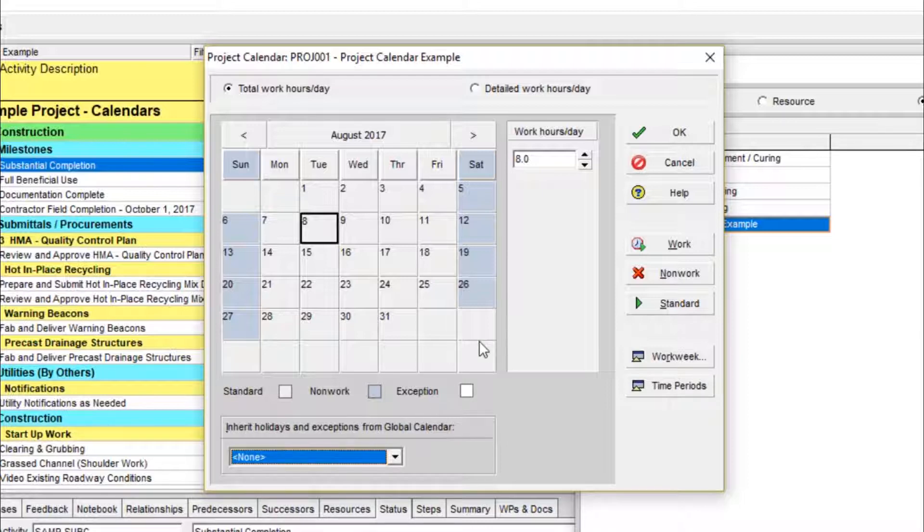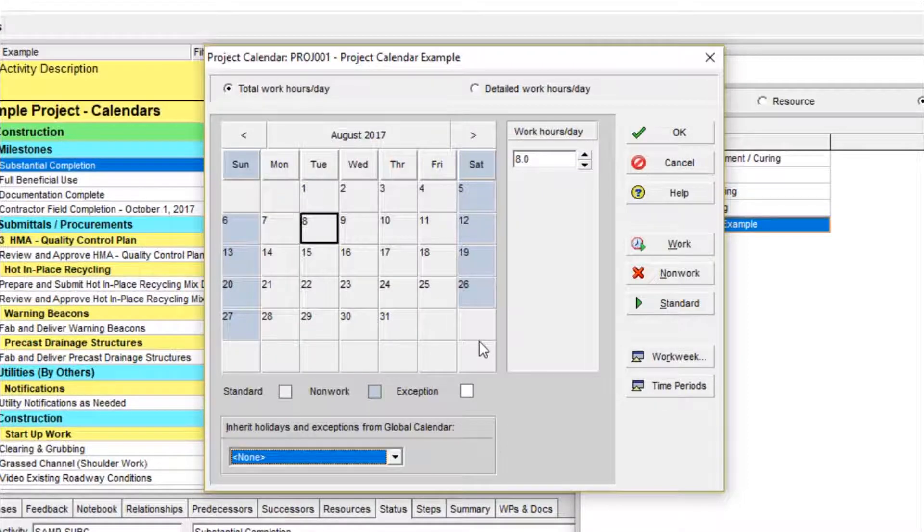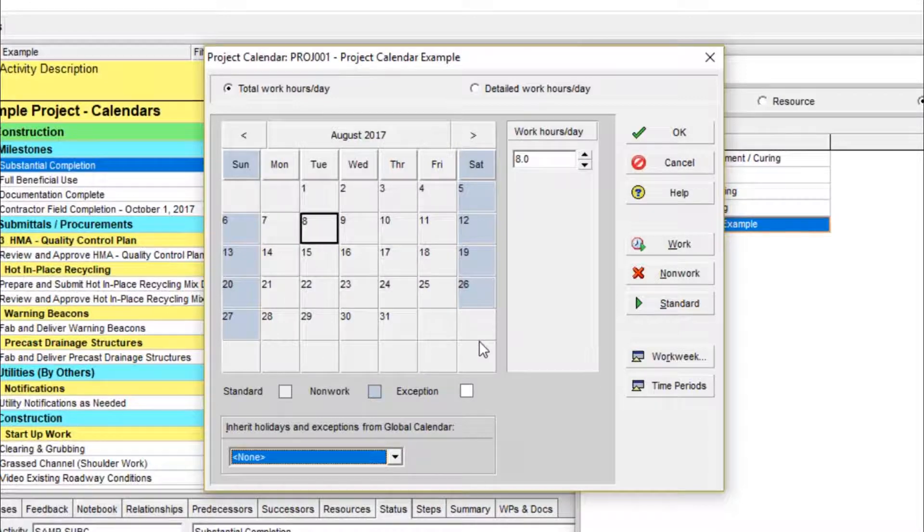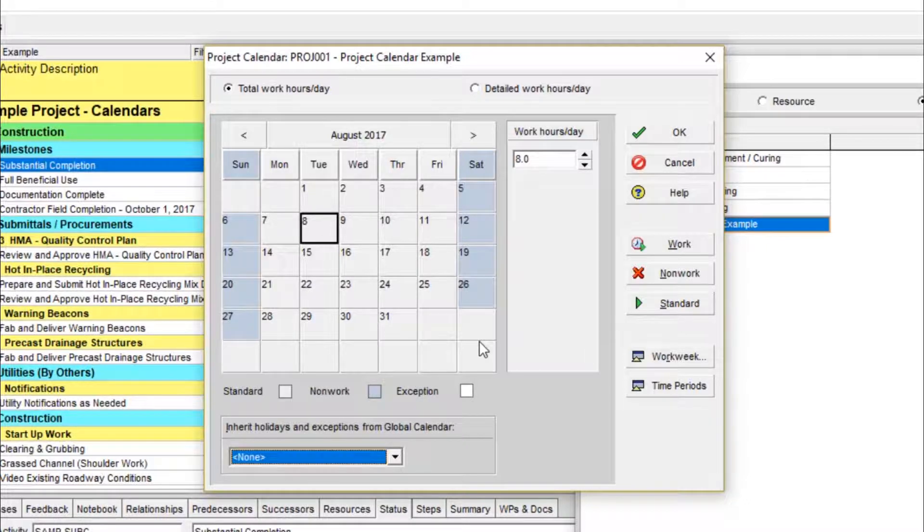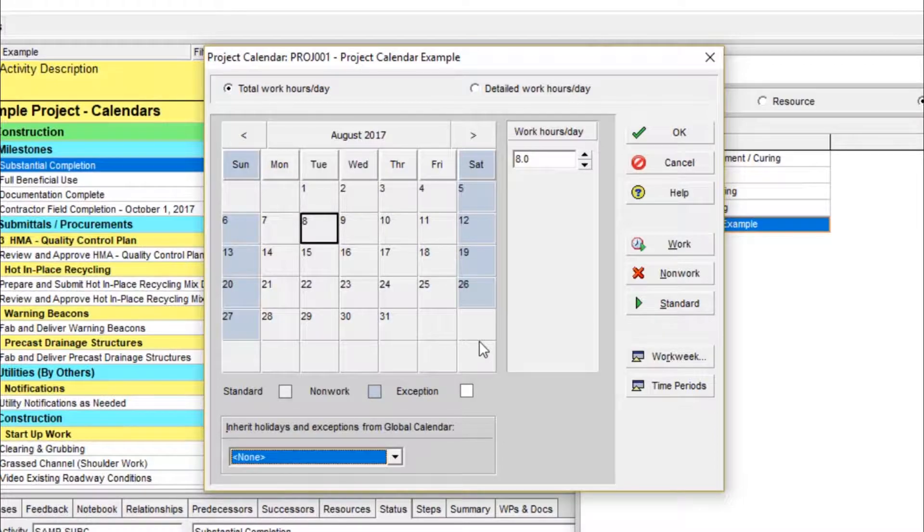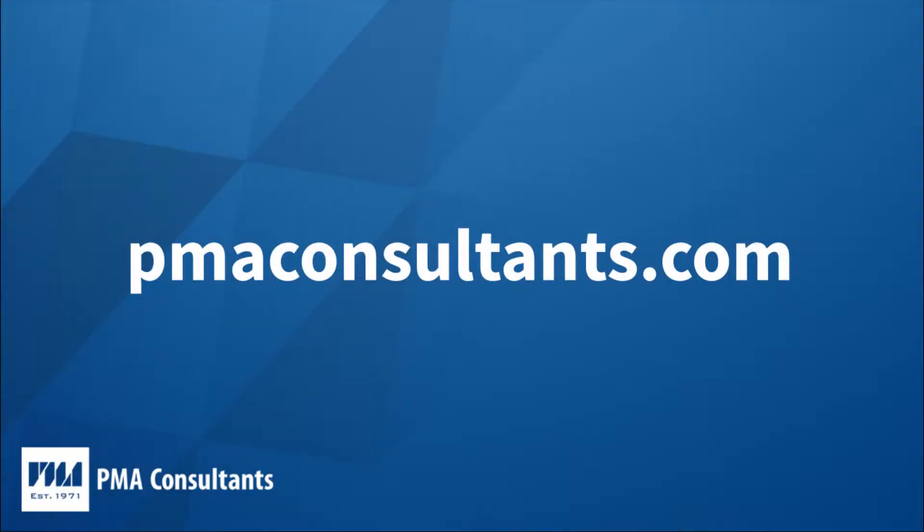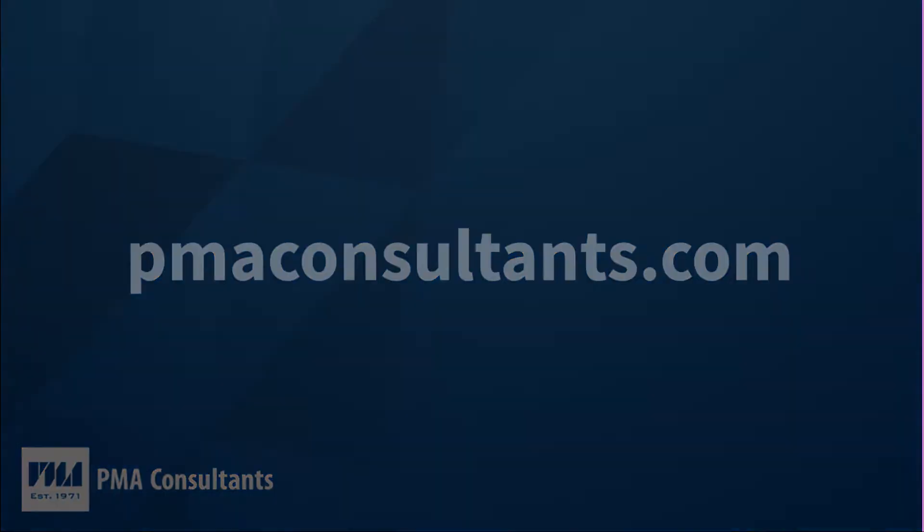When you're working exclusively with project calendars, you can be confident that the schedules you produce are being correctly viewed by anyone you're providing the XER file to, regardless of their import settings. And conversely, when you're viewing a schedule provided to you by another party that has project calendars, you don't have to wonder or worry about there being any differences. I hope you learned a little something from this quick tip. Please visit the PMA Consultants website for more clips on best scheduling practices.